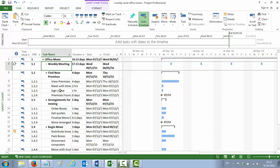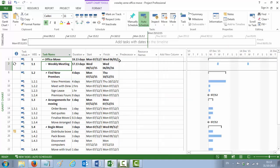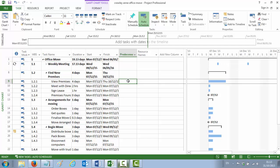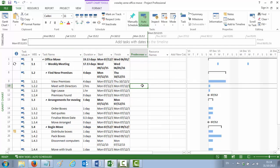Point number 10 asks you to link all tasks. Each task follows from the one before it, except for Finalise Move, which follows from Sign Lease. Weekly meetings don't get linked — they're just meetings not connected to any activities. Our first activity is View Premises, so we don't do anything with it. The next activity is Meet with Directors and it follows from the task ahead of it. What matters here is you go to the predecessor column and tell this activity which is its predecessor — in this case, View Premises. The figure you put in is the row number of the predecessor.